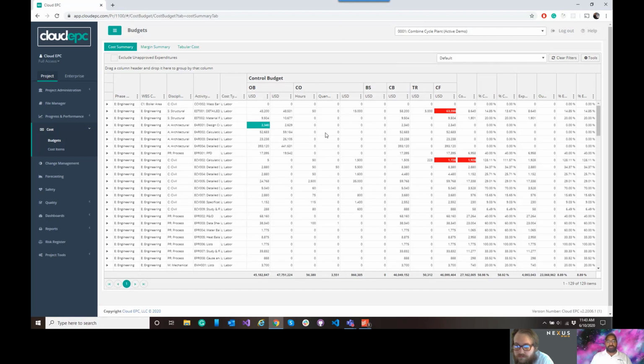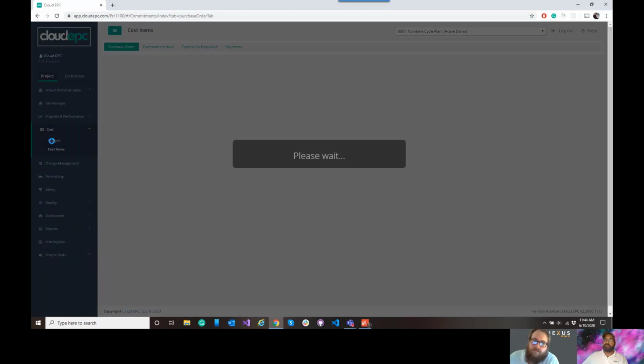We're going to leave that for another training video, but at any point in time, whether we're talking about a deviation or a change order, which we'll get to in a second, or we're talking about loading the original budget or the as sold, every control budget object stores those 4 pieces of information. And so again, it's the cost value, quantity, hours, and revenue. And let me just redo my view here.